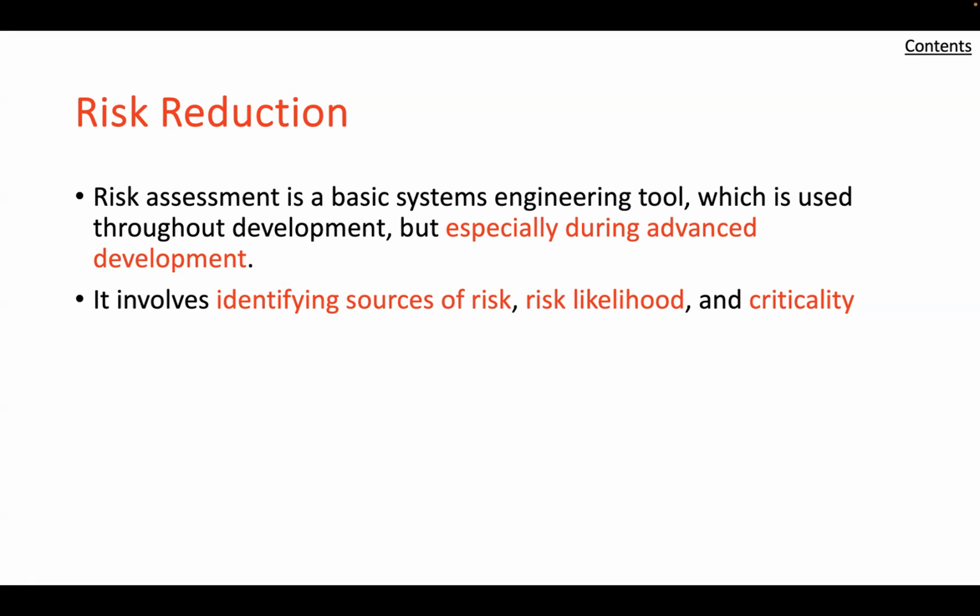What about how much development? A key decision that must be made in planning the risk reduction effort is by what means and how far should each risk area be developed. If the development is too limited, the residual risk will remain high. If it is very extensive, the time and cost consumed in risk reduction may inflate the total system development cost. Striking the proper balance calls on the exercise of expert systems engineering judgment.